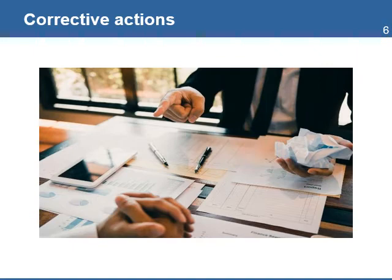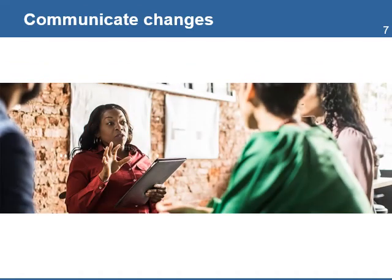Corrective actions should be discussed with the project team and the staff in charge of the activities so that changes can be implemented. All changes to the budget are to be communicated and incorporated into the system that tracks cost performance. Communicating the changes to the people that will use the information helps reduce the chances that work be done on canceled, postponed, or modified tasks.